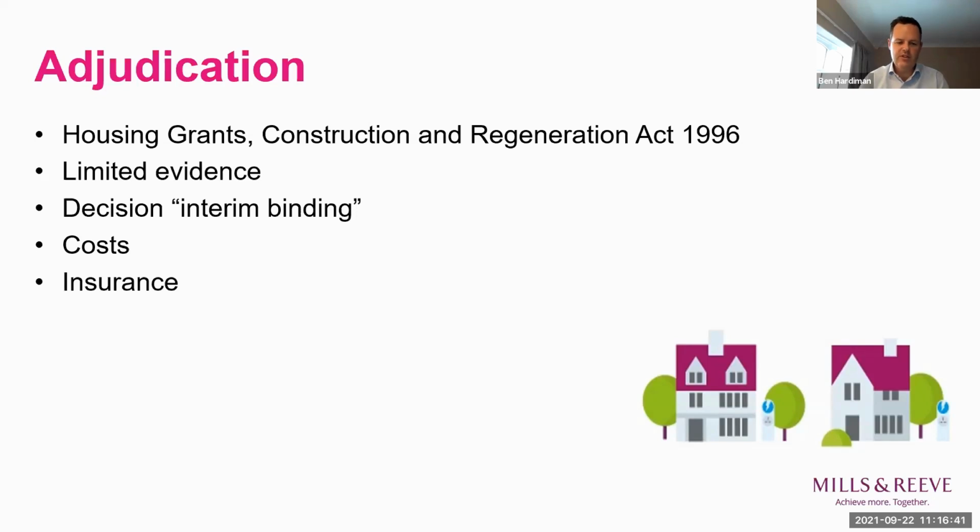And just on the question of costs, this is another area that can cause some tension. Unless agreed otherwise in writing as part of the adjudication process, costs don't follow the event as they normally do in litigation. So the successful party doesn't recover their costs.